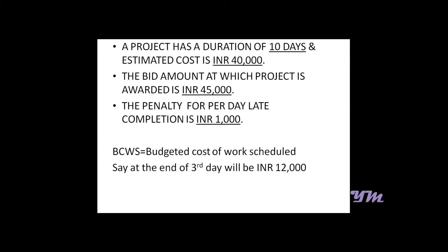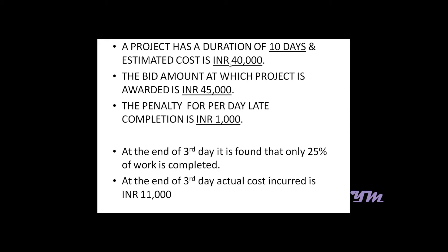The BCWS, which is known as Budgeted Cost of Work Scheduled, at the end of the third day will be rupees 12,000, as it is rupees 4,000 per day.